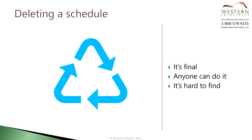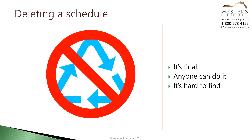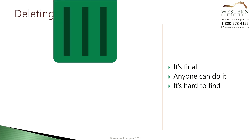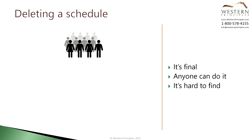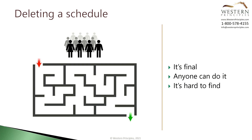When you delete a schedule in Microsoft Project for the Web, it really is a deletion — there is no recycling. When someone deletes a project, that project is straight up trashed and gone. Because of the collaborative nature of Microsoft Project for the Web, anyone on the project team could delete the project. This is something you need to be aware of, and a reason to occasionally export your schedule to an Excel file so you have a record of it. Fortunately, the delete function is kind of hidden, so it isn't really obvious how you delete a schedule — but let's see where it is.